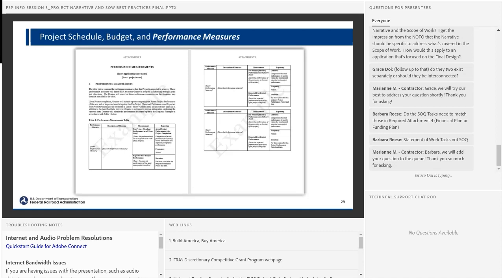The last attachment is attachment 5, performance measures. Performance measures are something that's been a part of our grant agreements for I think the past 4 or 5 years. They basically allow FRA to determine whether or not the improvements that were claimed in the application actually happened. There are 3 listed here. Generally, 1 or 2 make it through to the eventual grant agreement.